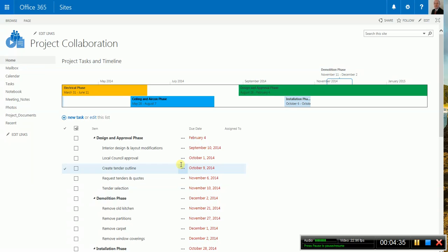Not everyone's going to remember to do that CC though, so you can actually drag and drop in Outlook. It'll create two inboxes, and once you have those two inboxes, you can drag and drop emails into the project inbox. Makes it a lot easier if you need to come back to a project maybe 12 months later and you want to see a record of what the correspondence was, rather than trying to trawl through your inbox from 12 months ago.